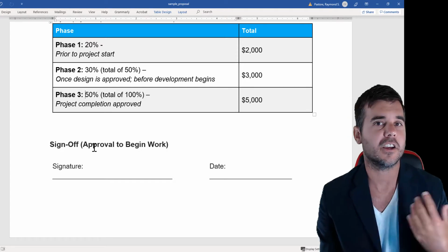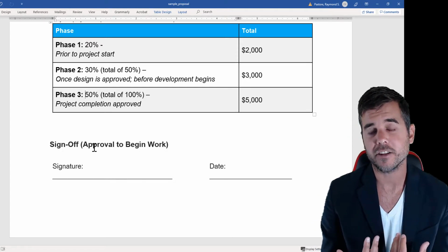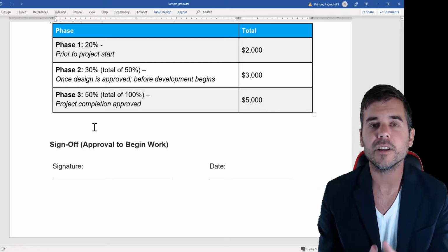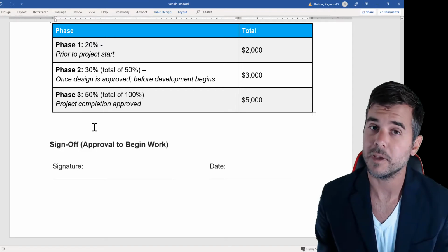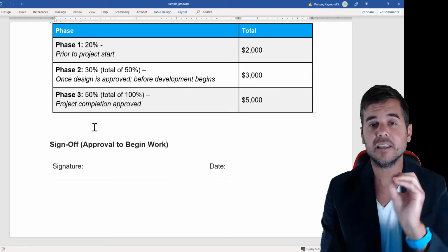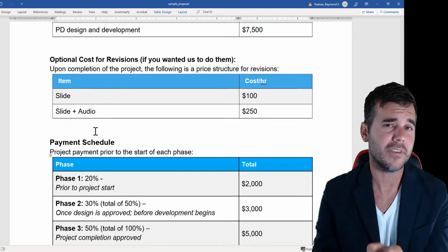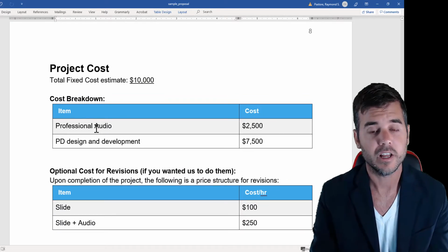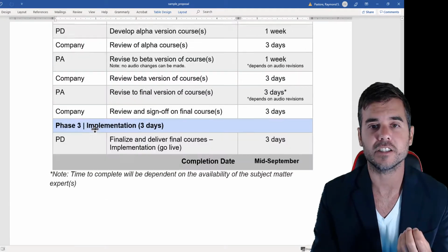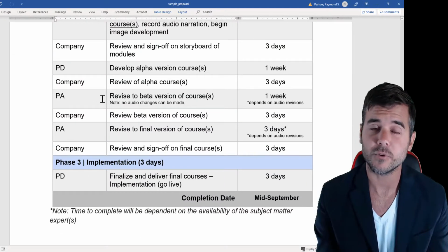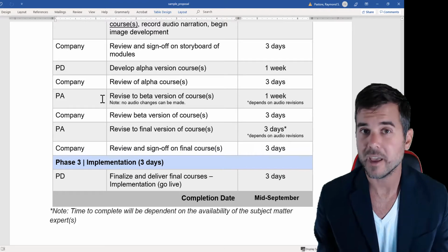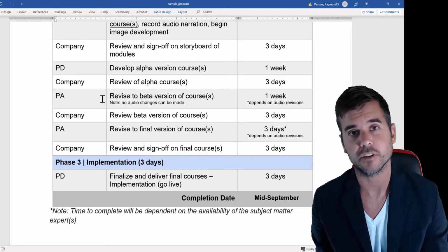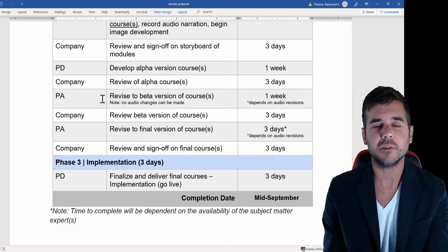So we start adding and incorporating all those components of project management, and all of a sudden this 8-page proposal that I've written here turns into like a 120-page proposal. And it's not that it has any different information than what I have here, but it goes into it in a lot more depth. Like I'll have a full Gantt chart versus just a simple project schedule that I've written out like this. I'll provide a full Gantt chart. I will have a quality management plan. How are we QAing everything? Different components of project management start to come into the proposal. For something simple like this, you don't need it.